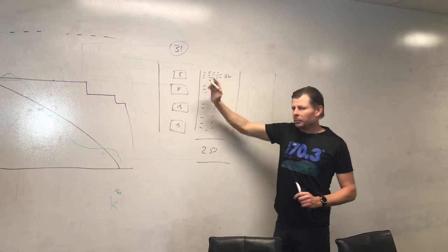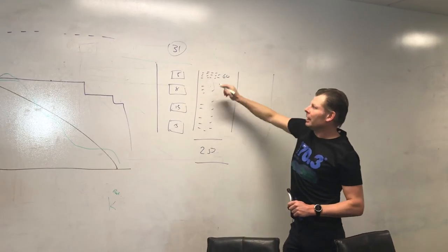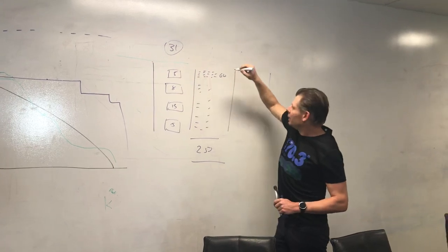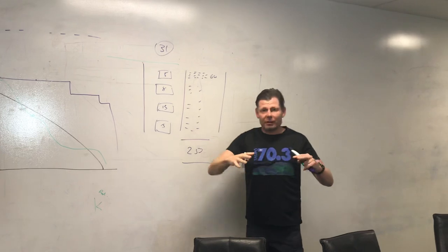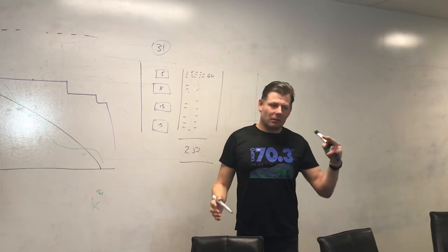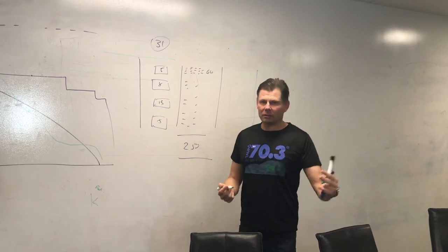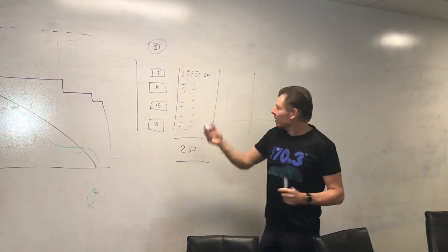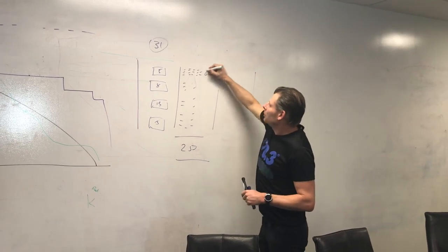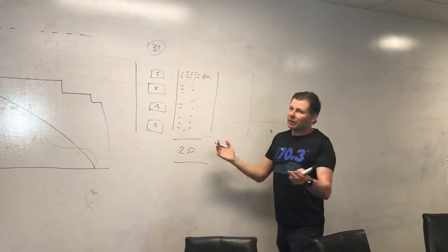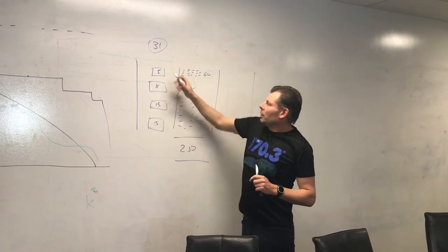What we do in part 2 of sprint planning, once we've set the goal and pulled the story in, is we task it out. So each story in turn, we go through each item that each member of the team has to do. And remember, with a user story, the whole team owns it. So the tester, the BA, the developer, if we need somebody from UX or a DBA, everybody's involved within the core Scrum team, that is, we capture. And we'll come to a number of hours. I don't know, it depends on the team, but in this case, let's say 60 hours. Then we go on to this next story.